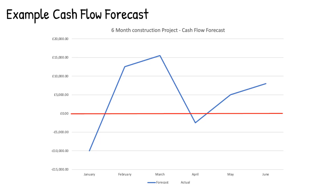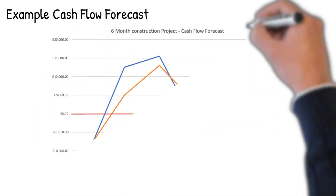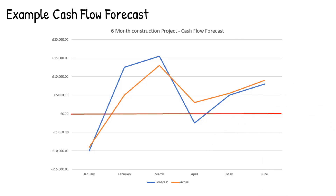It can be useful to update the cash flow based on actual progress and cash inflows and outflows as they occur. The actuals can be plotted on the same graph — shown in orange versus the planned forecast in blue — to present actual progress versus planned, and any variation between the two. This sometimes helps with future analysis and lessons learned on future projects.